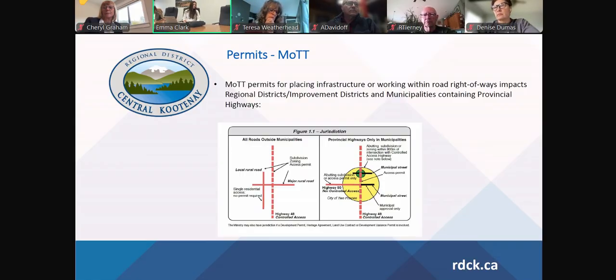The intent is to try and get this all wrapped up by November at the latest of this year. That should provide us with enough time for these outlier holdout properties to convince them. And if that doesn't happen, then the cost will be borne by the property owner. Or request an extension if you see light at the end of the tunnel.